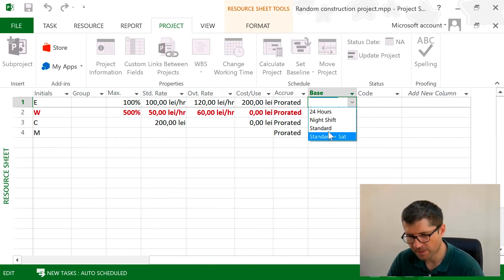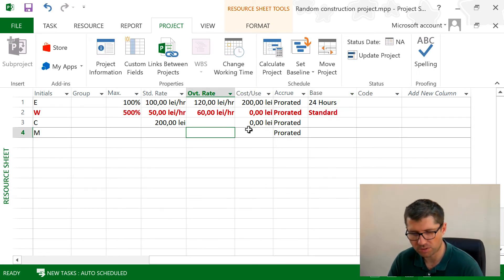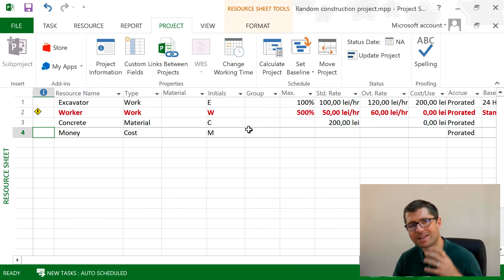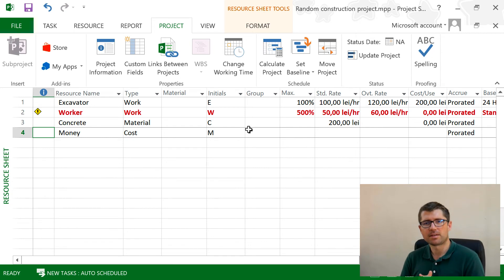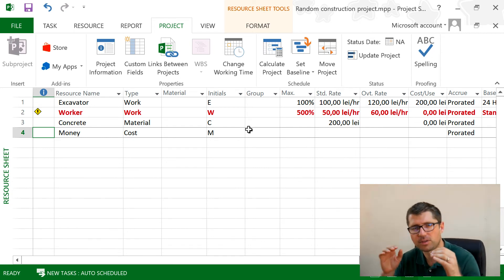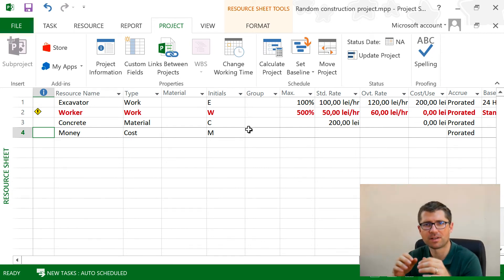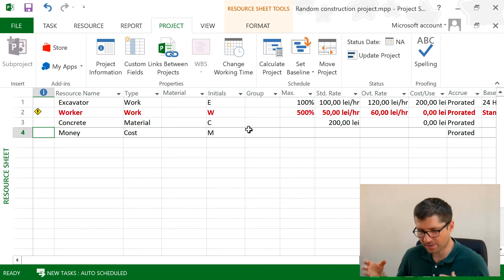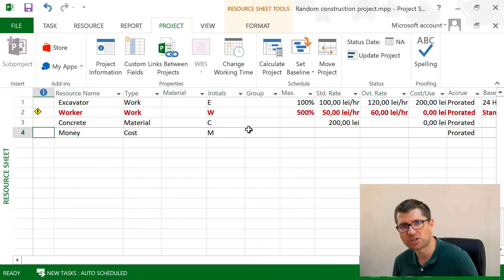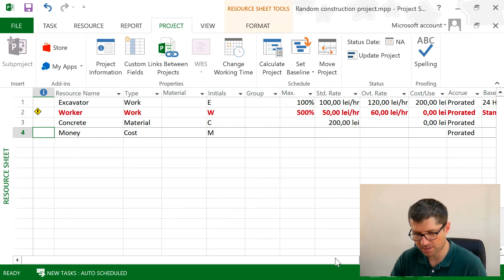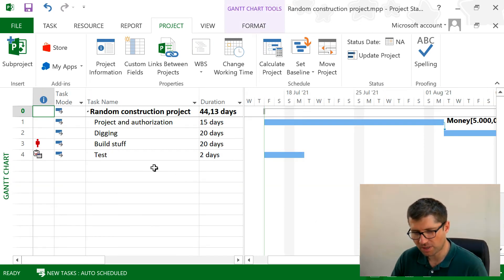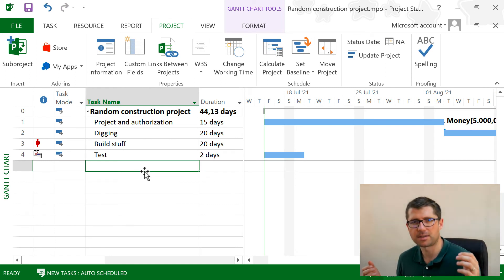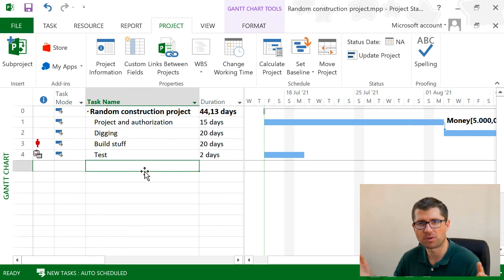So that's the thing. I can use calendars at the project level, task level, resource level, and this obviously will impact the duration and the cost of the task.